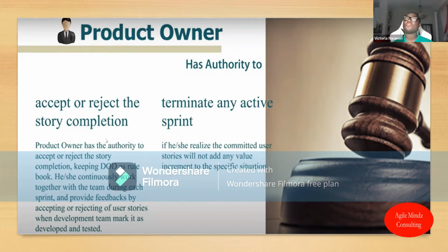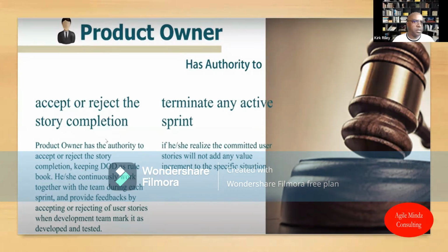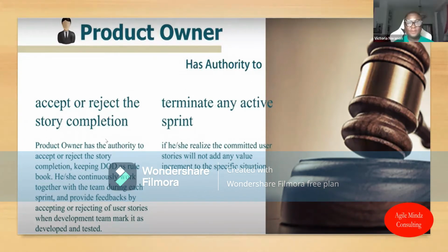Okay. I know that when I worked at a banking company, there was a time that we actually ended the sprint and terminated it. The only reason was because we decided to take a pivot on the project. The stakeholders decided to put a dead end to that project because it was taking longer than we expected, we didn't have the necessary resources, and we also had another team working on almost exactly the same functionality that we were trying to build.